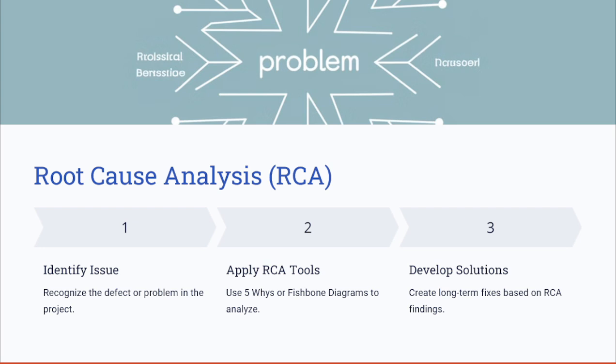The fishbone diagram can reveal that outdated equipment or poor material quality is the root cause of that issue. So this is the root cause. By identifying and addressing these issues, you as a project manager can take corrective action, and the team can implement permanent solutions to enhance the overall quality and efficiency.